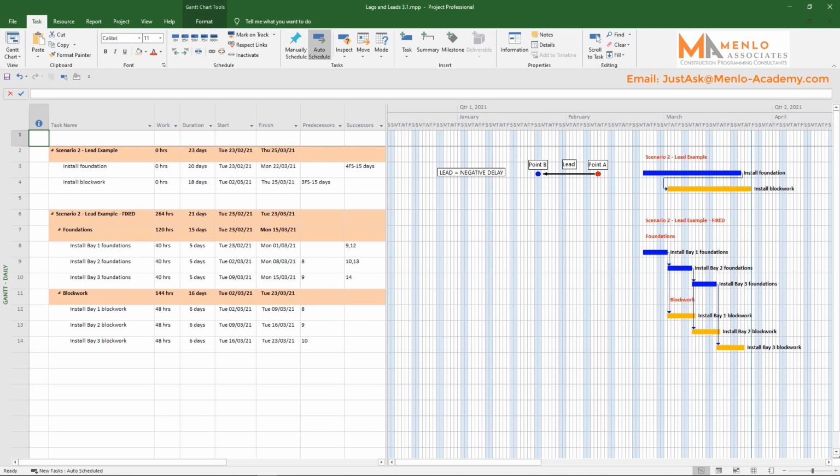Okay, so to summarise, you can essentially see that leads encourage you to leave detail out of your program, and it's this that comes back to bite you more than anything. This is why we say it's good practice to avoid leads and include the deeper level of detail which allows you not to use them. Doing this also avoids the assumptions masked as logic from interfering with your critical path and can also give you greater insight into your resourcing options and overall work strategy. Again, following this method rather than using leads will save you from wasting precious time and resources trying to solve issues that are difficult to foresee.